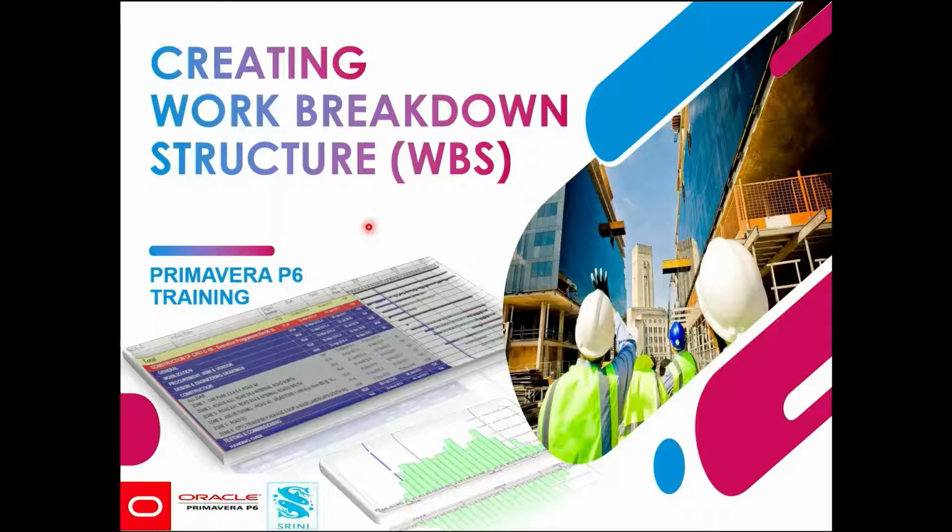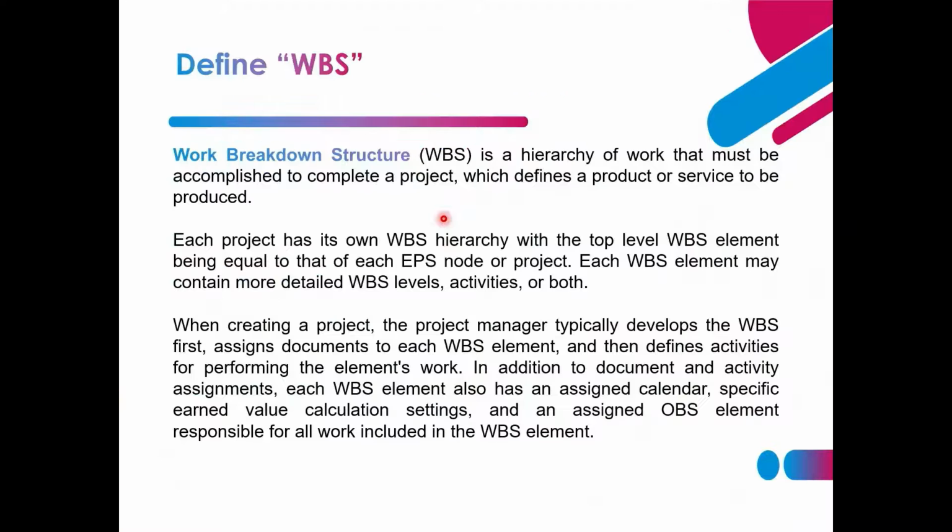Hi everyone. In today's class, we will see how to create a work breakdown structure, WBS, in Primavera P6. First, we need to know what a WBS is. A work breakdown structure is a hierarchy of work that must be accomplished to complete a project. Each project has its own WBS hierarchy, with the top level WBS element being equal to that of the EPS node or the project. Each WBS element may contain more detailed WBS levels, activities, or both.